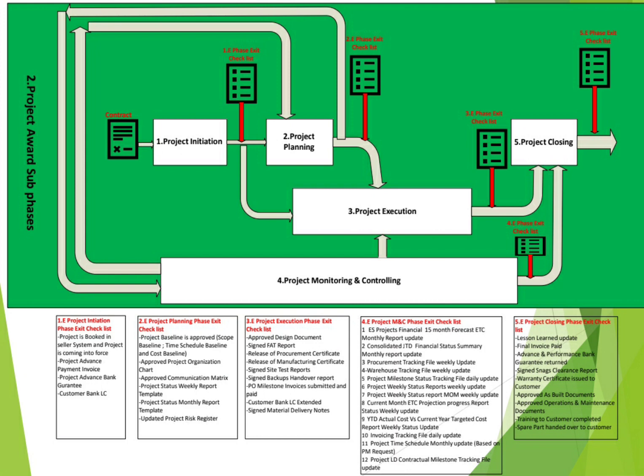Finally, we are proceeding with the project closing, where we completed all the different phases of project execution. The phase exit for the project closing: we have the lessons learned for this project, final invoices, invoices paid, advance and performance bank guarantees. We requested the customer to return them and we receive them back.